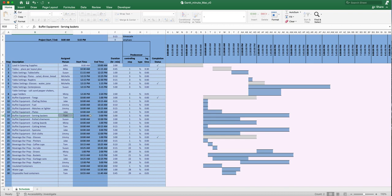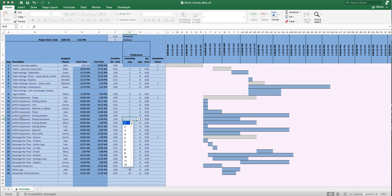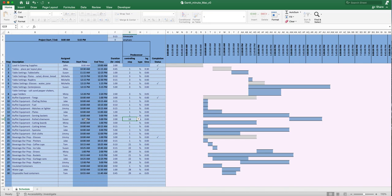You can check in with the person responsible for a task — for example, Tom is supposed to be there at 10 AM and working until 3 PM. If he doesn't finish on time, it could delay whoever depends on him. Right now Susan's start time isn't tied to Tom, but if controlling step 14 were set, she couldn't start until he's done at 3 PM — potentially affecting your event start time.